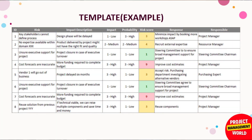Now let's see how the risk register looks and what columns it has. Here you can see a template example. We have several columns: first is ID — each risk gets a unique ID or serial number. The second column is the risk description, which we get from the identification process. Then we have the impact description — a proper description of what could happen if this risk occurs.